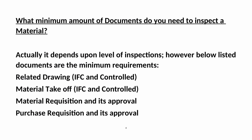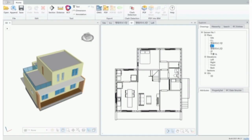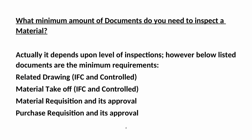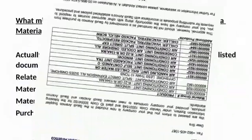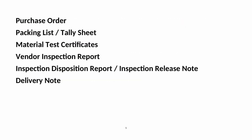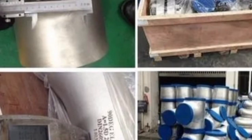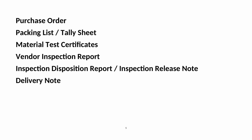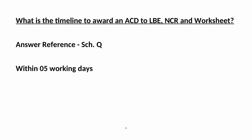Minimum required documents include: Related Drawing, IFC and Controlled Material Takeoff, IFC and Controlled Material Requisition and its approval, Purchase Requisition and its approval, Purchase Order, and Packing List.